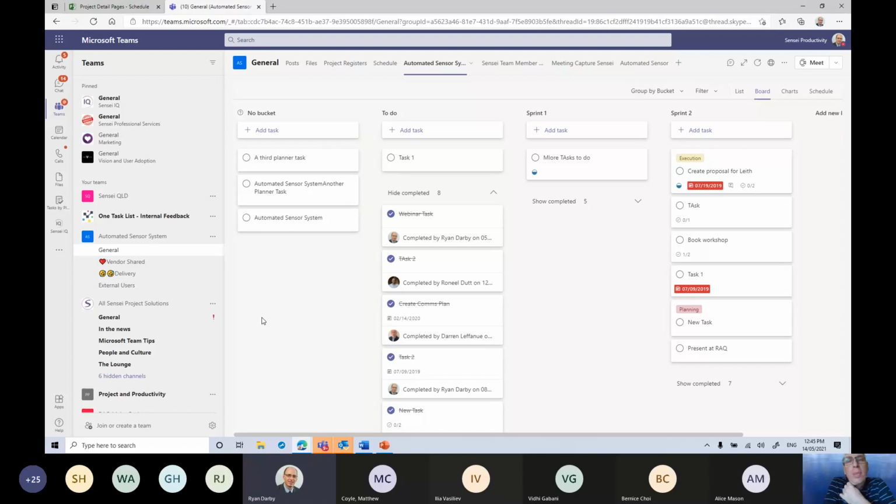Possible, a little bit trickier to actually do, but it's more of a process thing. It's not so easy to mess a planner up if I just send a task there. People see it, they'll drag it to where they want. Schedules are usually a bit more advanced in terms of the logic they're modeling, so you need to watch out if you do send updates back, just because it's technically possible. Does that scheduler want their schedule being automatically updated by you? You just need to make sure everyone's okay with that before you look at doing that type of thing.